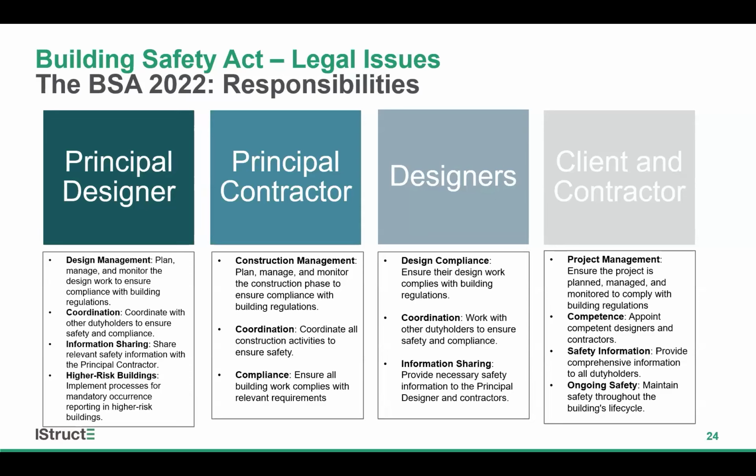So the principal designer should ensure that everyone else involved in the pre-construction communicates and cooperates with one another, and by coordinating their work. As I say, this seems to be a significant burden and one that could lead to exposure and claims for the principal designer. There's also the obligation to share information, and for higher risk buildings, the principal designer should also implement processes for mandatory occurrence reporting, which is something I'll consider later on.